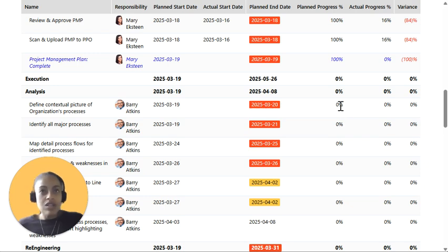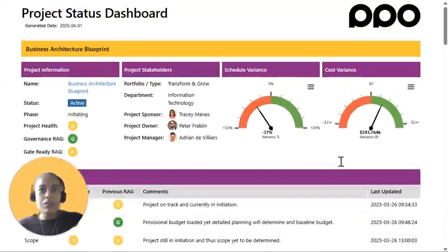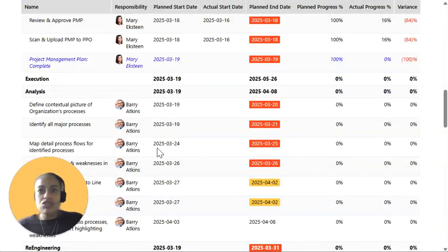So, how this worked was it would determine whatever this information was reflected in your Microsoft Project plan. If you've done this via an MSP import, whatever was reflected in the plan would continue to show as at the last import date. So this created some misalignment when talking about the variance and understanding what's driving it, because these two aren't aligned. It continues to count at the project level, but there's no calculation of planned progress at the task level. So we've resolved this with this new feature.